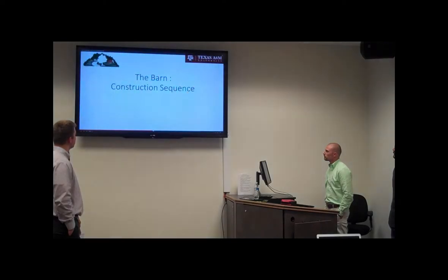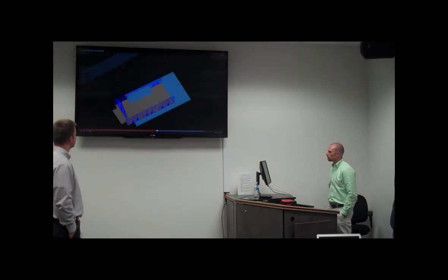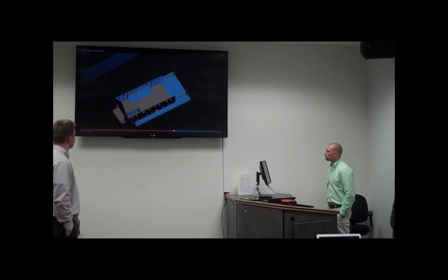The construction sequence of the barn starts with laying slab on grade foundation, followed by timber frame for external double height walls. Meanwhile, to fast track the project, several other activities would also start simultaneously, such as curtain wall mullions. Once the interior frames are installed with gypsum panels, the second floor slab would be constructed and flooring with interior fit-outs would follow on the first floor.